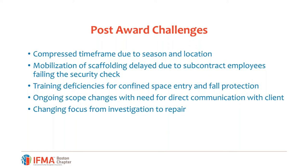They had to do this because we had to be out of the building by late May, early June, in order for them to be able to reactivate the building in its communications mode, because they need to go to both buildings functional for the summertime up there. So in any event, we had a hard deadline. We had to get it moving, and the Navy did this contracting. So we basically got a $1.2 million contract to analyze and fix the building in less than 2 weeks.